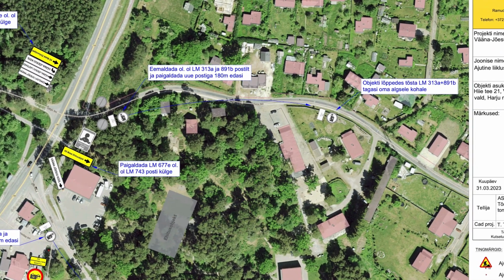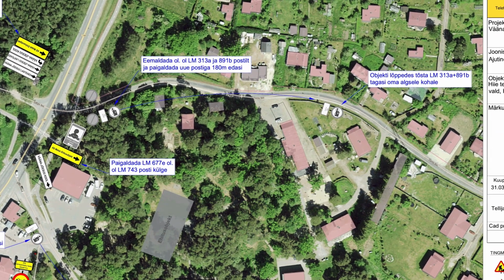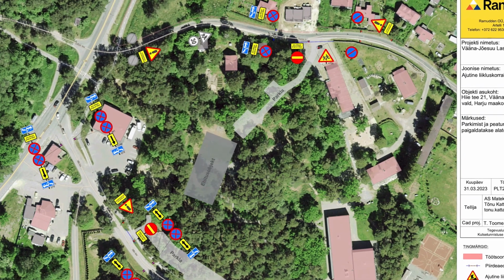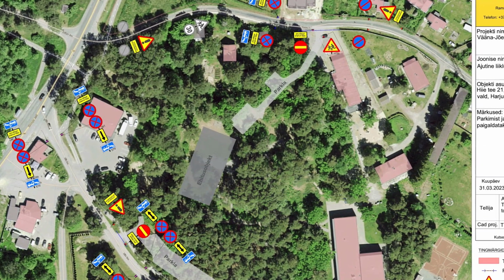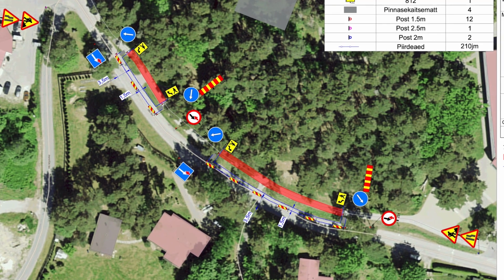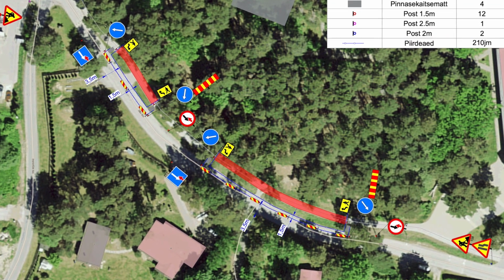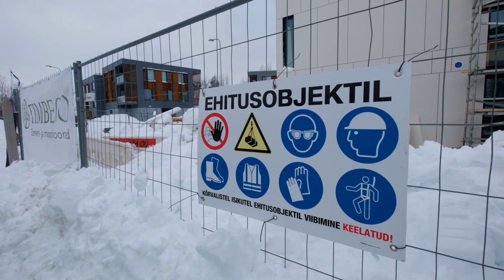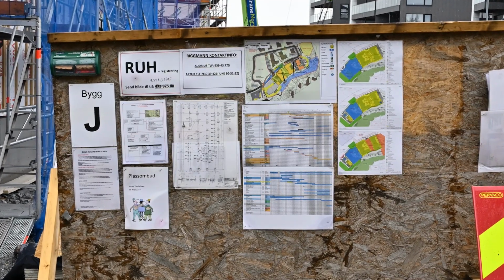Managing street use permits involves coordinating the use of public spaces, roads, and streets during construction while ensuring safety. Since construction activities can disrupt traffic, minimizing these disruptions and preventing accidents is essential. Local authorities may require traffic management plans and the installation of new traffic signs to maintain safety around the site. Safety and work instructions are easily accessible at the site entrance, in staff rooms and offices, and are distributed to workers upon starting their duties.